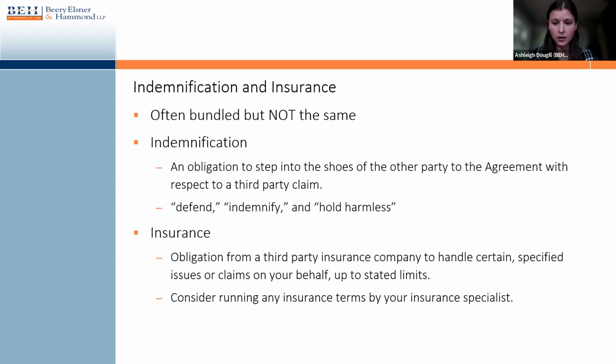Second, and separately, the vendor could seek to cover some of that cost from providing that indemnification to the city from its insurance provider, up to their stated limits in their insurance contract. So as you can see, for the contractor, the insurance can serve as a backstop, but they are not required. There are times when the contractor would rely on its insurance that don't involve indemnification, but when it comes to indemnification, they're probably going to seek to recover some of that cost from their insurance provider. So that is the difference between the two.